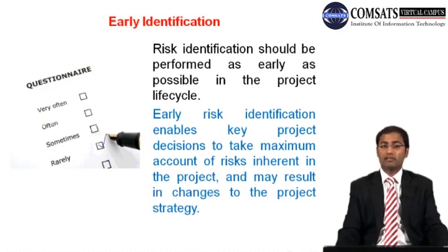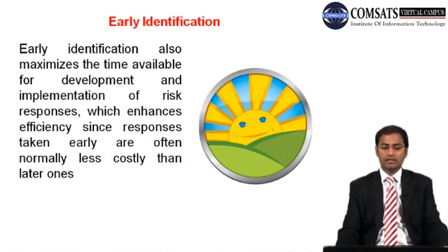So early risk identification can help you in that. And early identification also maximizes the time available for development and implementation of risk responses, which enhances efficiency, since responses taken early are often normally less costly than the later ones.